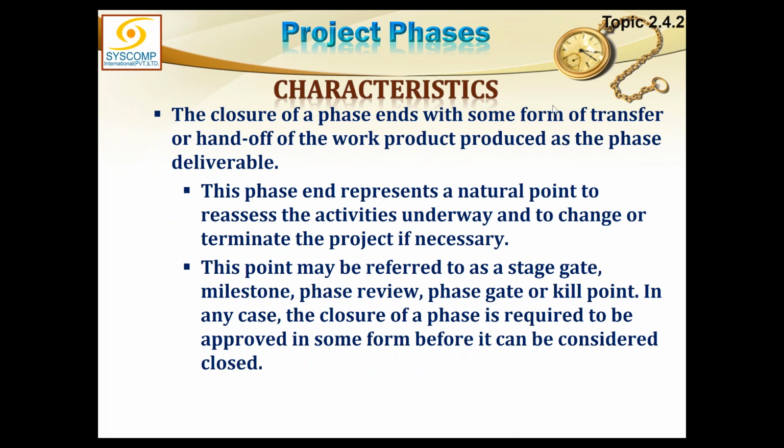Closure of a phase ends with some form of transfer or handoff of the work product produced as the phase deliverable. So the output of this phase may be the input of the other phase. This phase end represents a natural point to reassess the activities underway and to change or terminate the project if necessary. This is where the governance comes into play.